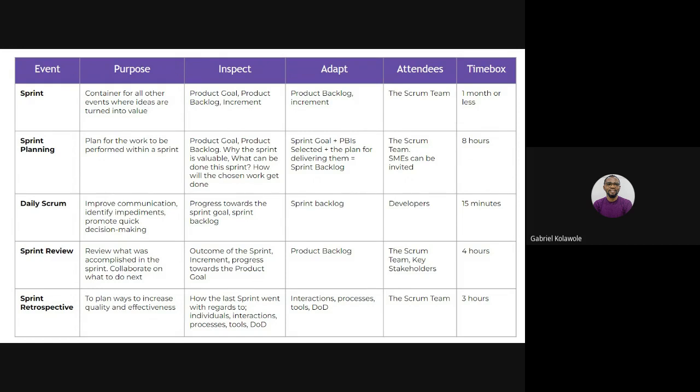Many times these days they are written as user stories. So we write user stories to represent the needs of customers, and they are populated in what we call the product backlog. The product backlog is an emerging list. So as long as that product is still existing, your product backlog will keep emerging. Customers' needs, customers' requirements, everything will keep going back to the backlog.